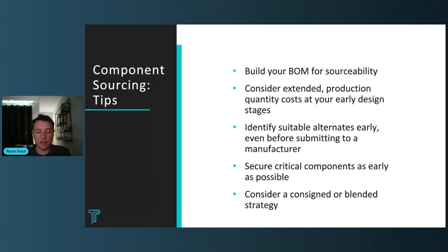Component brokers are the ticket scalpers of component distribution. If you're going to a broker, you might pay 10x or 20x the price for each part. Think of how that might drive the cost of your build. If this is one of those line items that defines your material cost, you think you're paying $2.37 per part, and all of a sudden it's $20 a part. You may have just blown up your budget right there, and that's before you consider the additional costs associated with validating that these components are acceptable coming from the gray market.